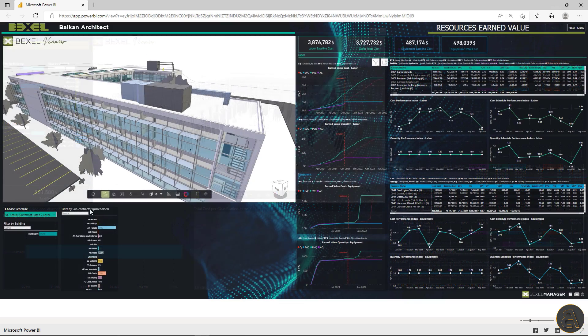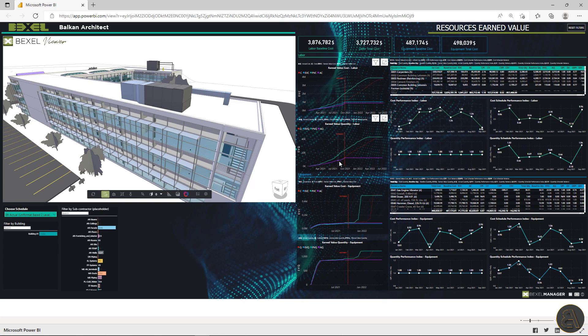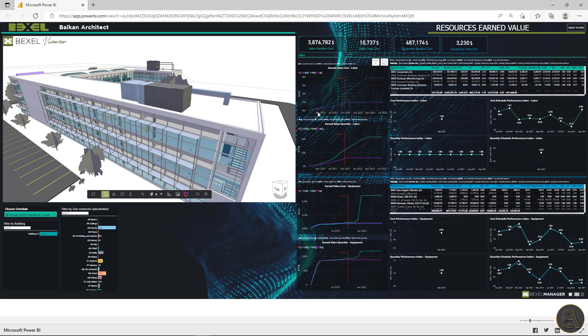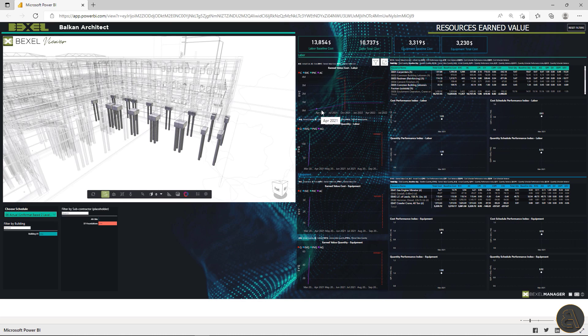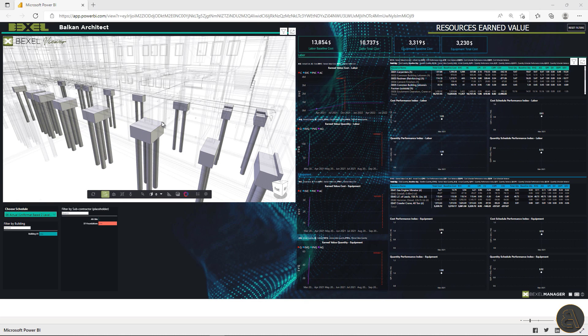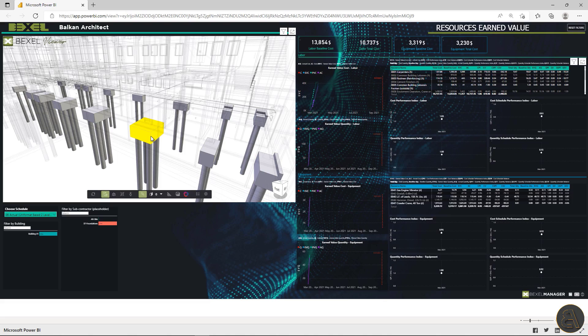And for the end, I will go through the resource earned value analysis dashboard. Here we can see earned value for cost and quantity by labor and equipment, check resource cost and schedule performance index filtering for the desired time period by desired schedule subcontractor or element selection.